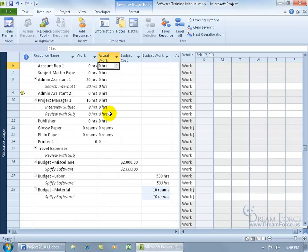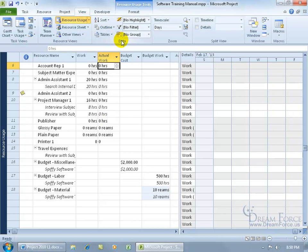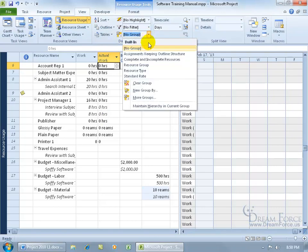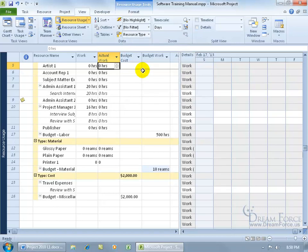You'd have to count up all the hours, but instead you can group your resources by type. Come up here, click on the view tab, go to the data group, click the drop-down arrow where it says 'no group,' and select 'group by type.' When you select that, it will have your cost grouped together and your material resources grouped together with your budget — making it easy to look at the totals and compare them to the budget.